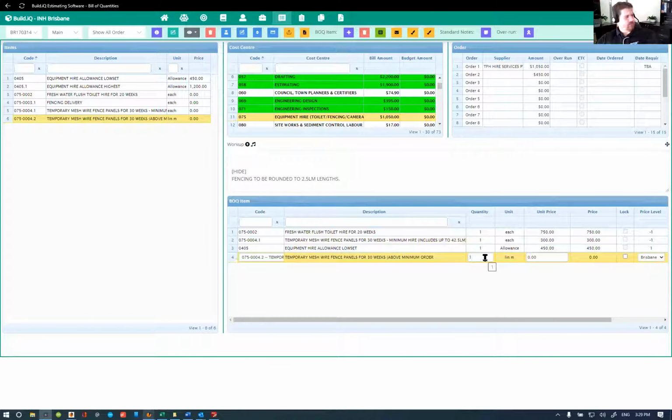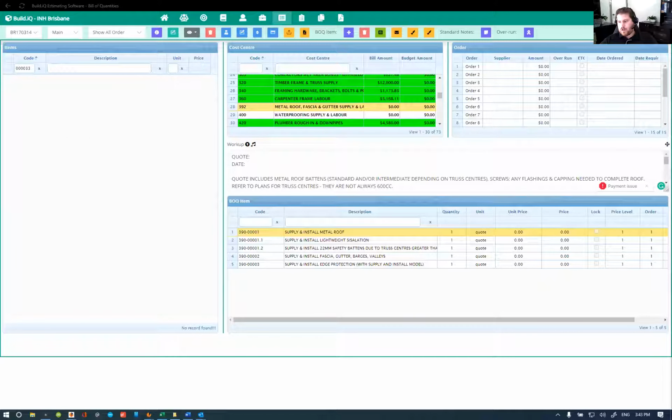Now the metal roof, once again, we'll have a look at a couple of quotations and see how we fare based upon square meterage. So this is that same 175 square meter house. So without anti-con, which is not a standard finishing for us, 12,242 divided by 175.87, about $70 a square meter, including your guardrail.